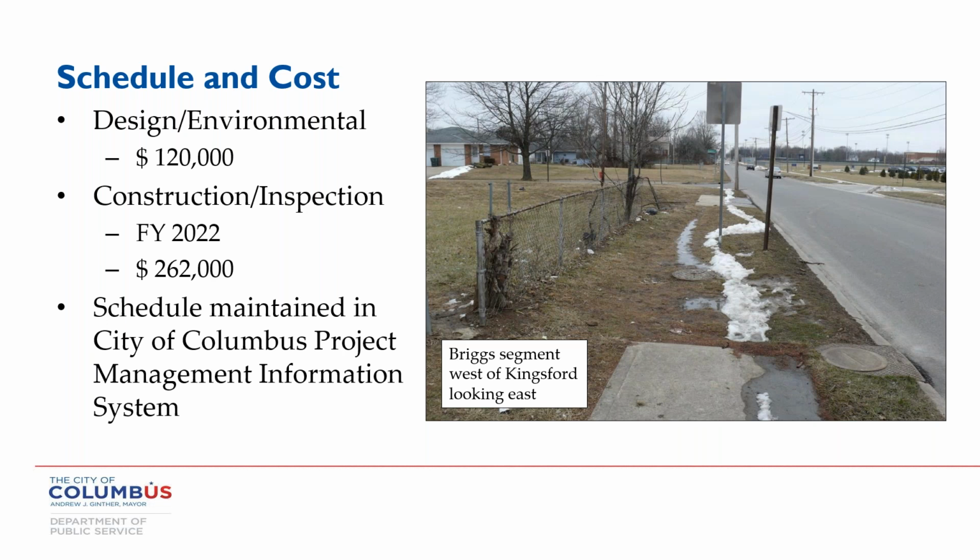And so, like I said, these are federal dollars. So you just want to make sure that whatever schedule you propose, you're able to hit it, and that you propose it knowing that you're going to have to meet all of your NEPA requirements. And so there we said we're going to finish it in fiscal year 2022. If you could go ahead and go to the next slide.